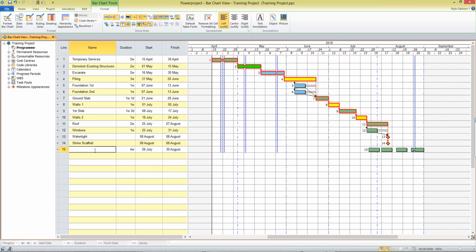And I can come over here to the table and I can call all the tasks on that line Apartment 1. Now, to name the task specifically, I can click on the little plus sign next to the line number and give each task a specific name too. So that's ceilings, carpentry, let's say plumbing and plaster. So just 4 tasks in this case. When I roll them up, they're all shown on the same line.